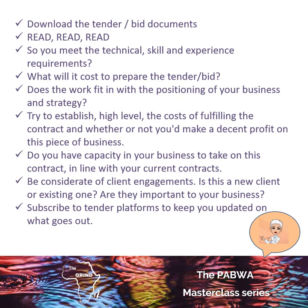Also, be very aware — what does it cost to do the tender? I'm not talking about the pricing you put in the tender document. I'm talking about the physical cost in the preparation of the document. That includes your time, the person assisting you — whether it's an admin person or a procurement person — the printing of documents, the design. In some instances there are design elements, copy and creative that go into it. So just be aware of what the preparation cost for that bid is.